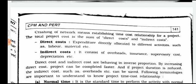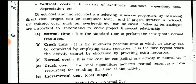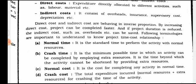Crashing of network means establishing a time-cost relationship for a project. The total project cost is the sum of direct cost and indirect cost. Direct cost is the expenditure directly allocated to different activities such as labor and materials. Indirect cost includes overhead, insurance, supervisory cost, depreciation cost, etc. Direct cost and indirect cost behave in inverse proportion — by increasing direct cost, the project can be completed faster.